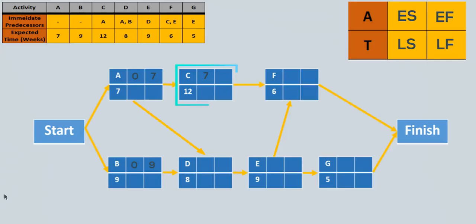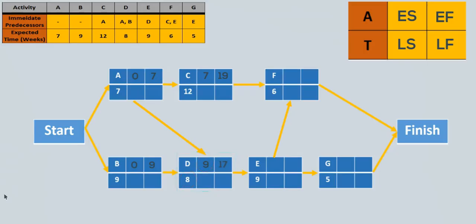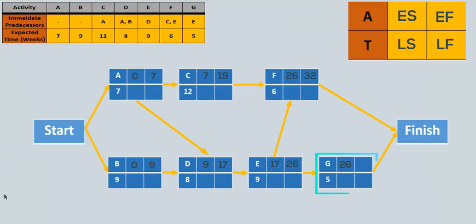C will have an earliest finish time of 7 plus 12, which gives 19. D needs both A and B to be finished before it can start. Since the earliest finish times for A and B are 7 and 9 respectively, the highest of the earliest finish times preceding an activity will be the activity's earliest start time. So D starts at 9 and finishes at 9 plus 8, which gives 17. E has only one predecessor D, so E can start at 17 and finish earliest at 26. F has predecessors C and E; since the higher earliest finish time is 26, F can start at 26 and finish at 32. G also can start earliest at 26, since it has only one predecessor E, and G finishes at 26 plus 5, which gives 31.